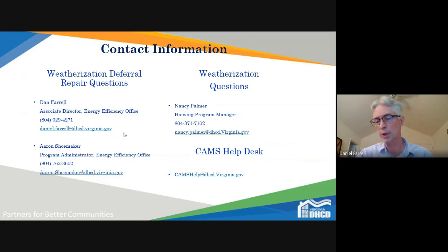And then to your second question, Leroy, we're going to set up a performance pool so that we've got additional funds that we can bring to bear. We can amend your agreement and add funds to your agreement if you find that you're running short of funds. We don't have that established just yet, but we're in the process of working on that. The idea is that if you're 6 months into this and you've already spent down your budget and you need some additional funds, you can come back to us and we'll work with you and see what we can do to get some additional funding.